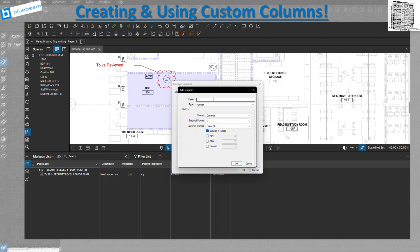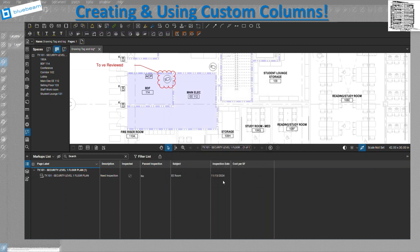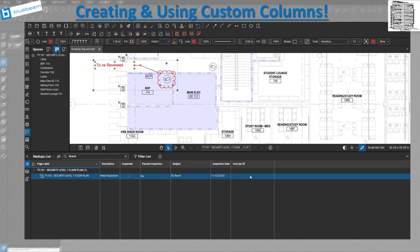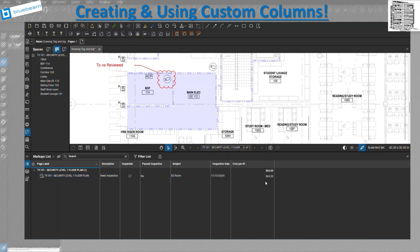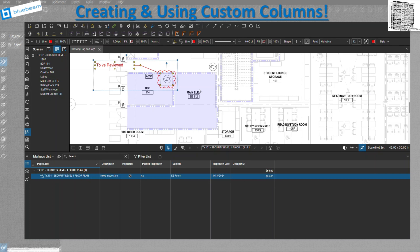I'll name this column 'Cost Per Square Foot.' Once added, a line item appears and I can click to enter a value like 65. However, this markup is just a node right now, so it won't calculate anything on its own — it won't produce a cost. To get a calculated total, I need an area measurement. Let me add the Area column from the predefined columns by going to Manage Columns and making sure Area is checked.